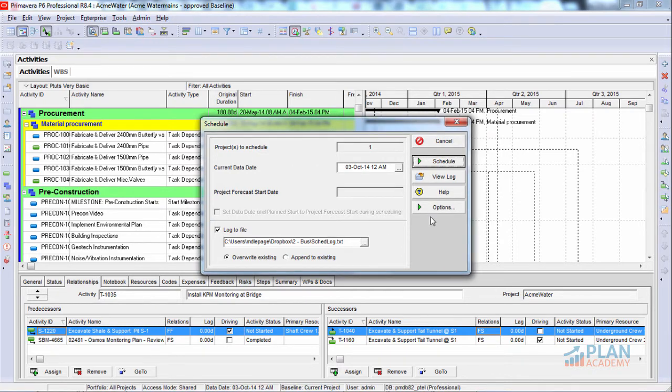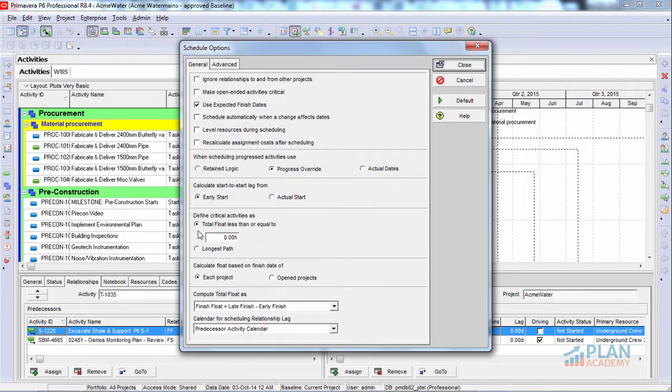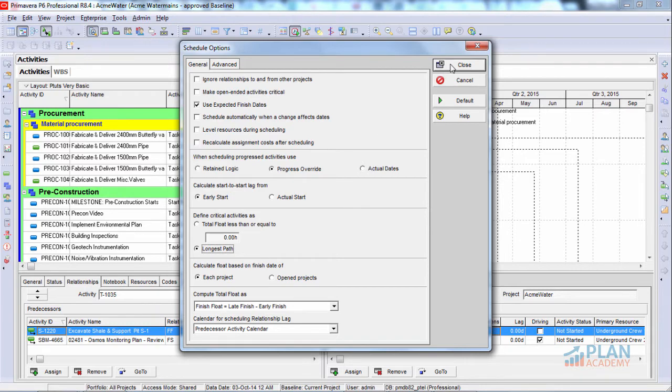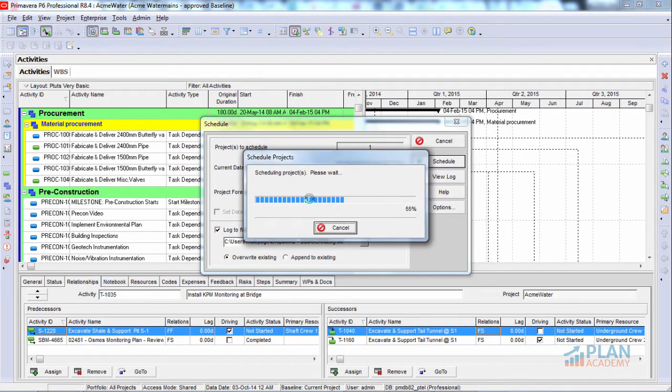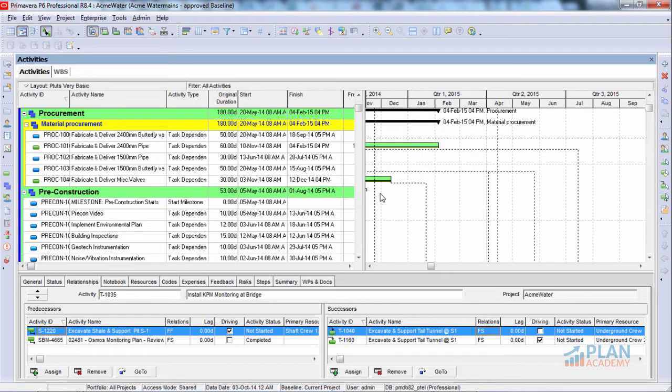So we know now that when we're in Primavera, we can go into the schedule options and we can turn on the longest path option here to find critical activities as longest path. Go ahead and reschedule our project. Now, having done that, we want to look at the results. What is the longest path of the project?